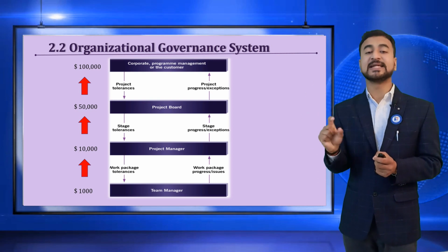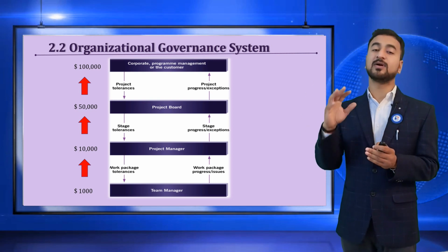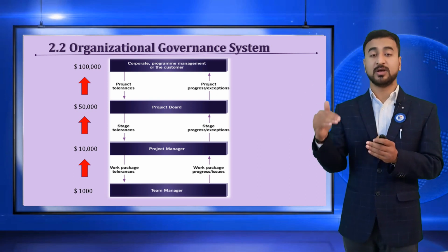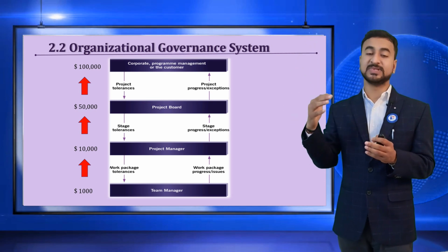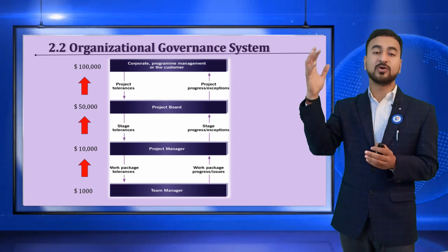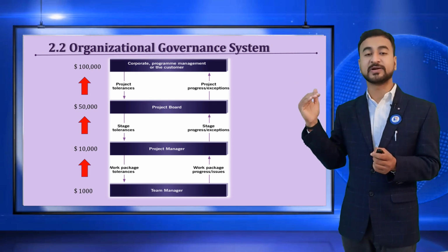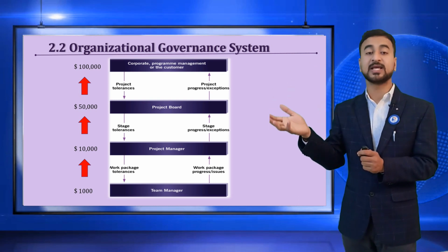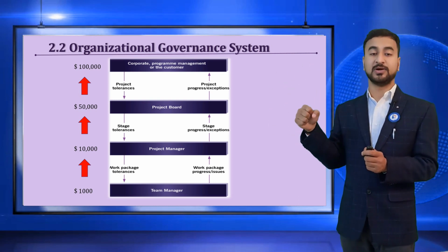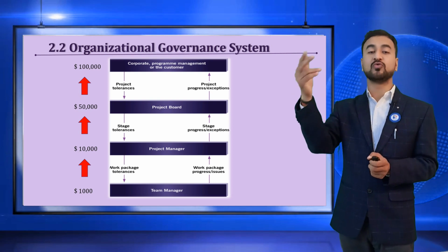Until then, a particular level of authority will take the call. Beyond that, they can escalate to the next level. That gives you a synergy: you do not need to involve your top management in small trivial things. That saves their time for strategic thinking, but simultaneously they don't lose control, because beyond a certain limit you have to come to them.